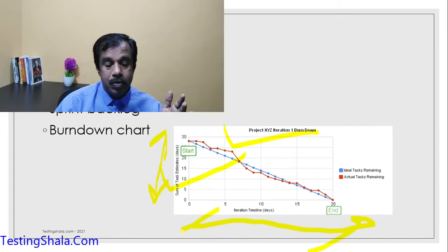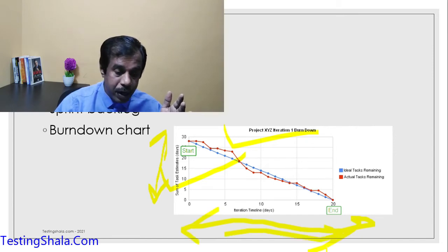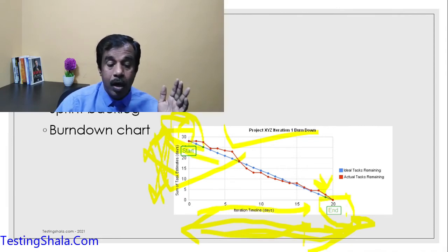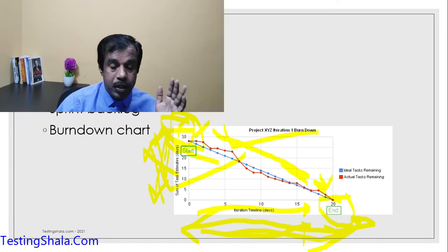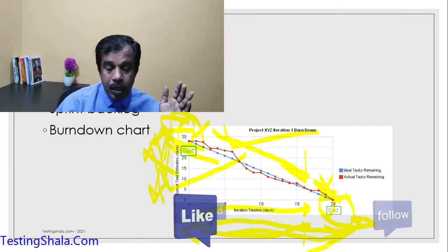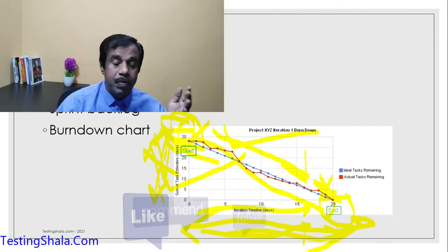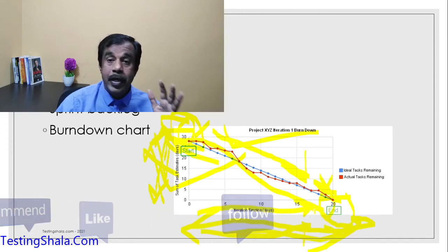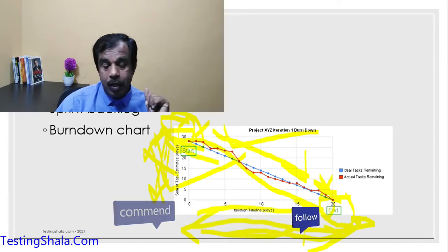towards a days timeline, right? The sum of the estimation of the tasks is a total of 30 days of work. So that means all activities planned here, we are able to burn and deliver properly. If something is not happening as per the ideal task planning, then there should be a mechanism of escalation by the Scrum Master if he needs any support from anybody in the team.